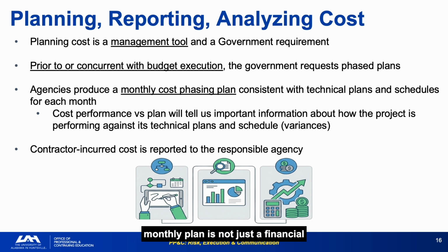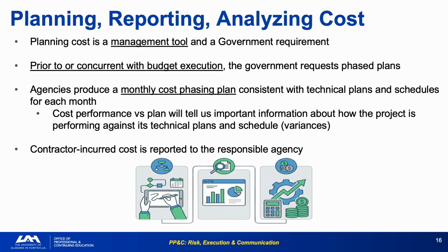The monthly plan is not just a financial instrument. It is a technical progress indicator. A cost plan that is not grounded in the work schedule will tell you nothing useful when actuals deviate from it, because the plan itself is not an accurate reflection of when work should be occurring. Every time you update a cost plan, validate it against the current schedule. If the schedule has changed and the cost plan has not, the plan is no longer a useful analytical reference.